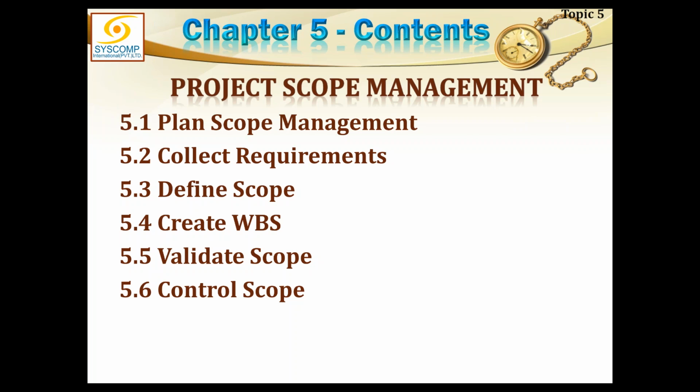Once the requirements have been established, you will end up with a comprehensive requirements document, and you must also create another thing, and that is a requirements matrix. What is a requirements matrix? You will study it in subsequent slides, but the requirements matrix is a tool by which you trace your requirements to the deliverables.